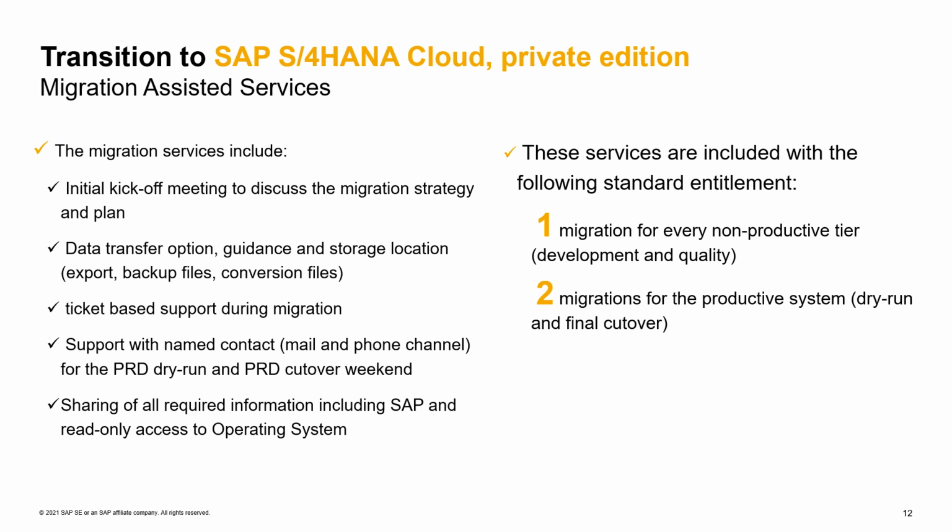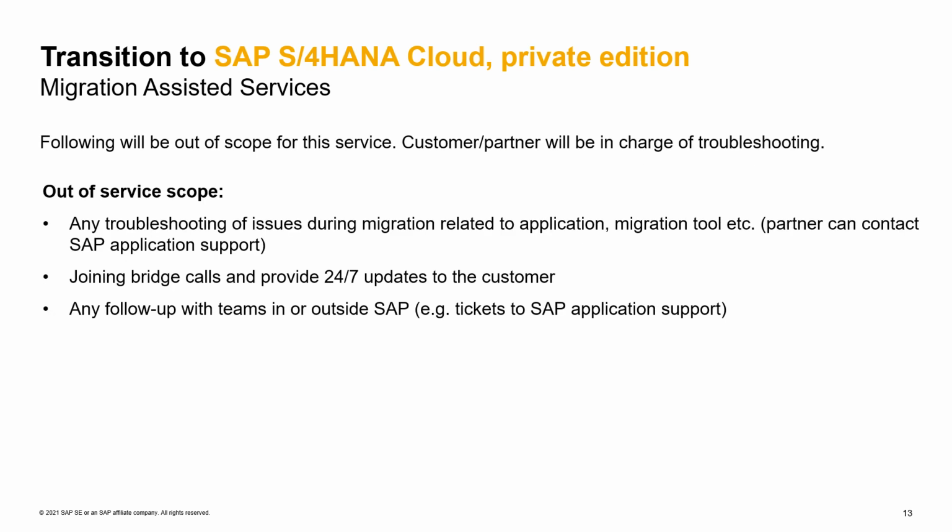The migration services cover one migration or conversion for every non-productive instance, typically development and quality environments, and two migrations or conversions for the productive instance, in order for you to have a dry run before the final cutover. It is worth mentioning again that you as a partner are fully in charge of the migration process and therefore responsible for any required troubleshooting.